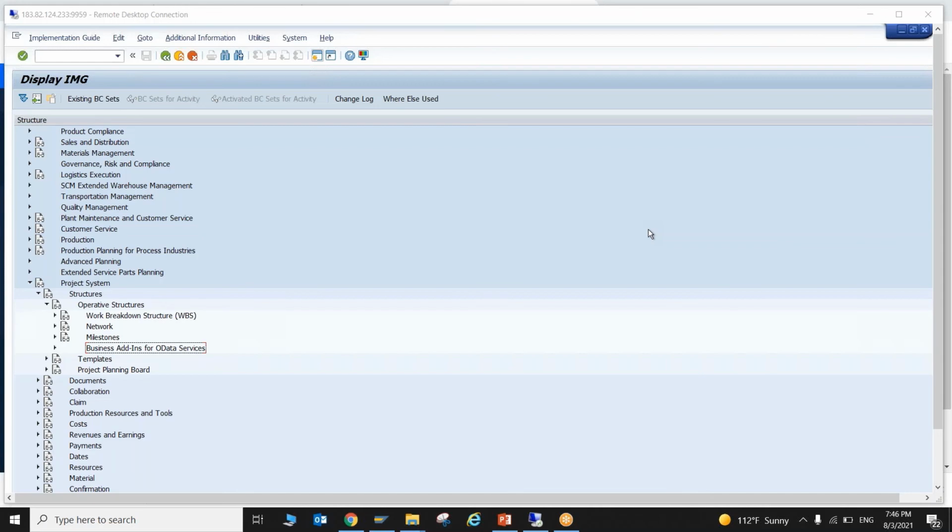In the sales order, we have to define the billing plan type. Okay, and then the item category also has to be assigned with the billing plan type. That is the milestone billing plan type 01. So that is clarifying exactly what the integration point is.